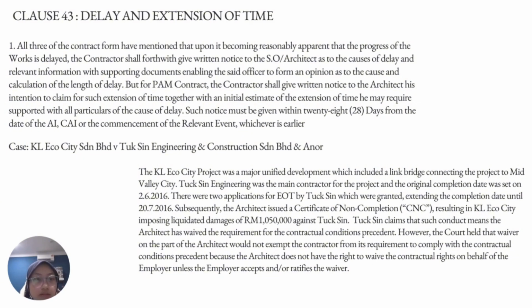Case that related to this clause is the KL EcoCity versus Tuxin Engineering. The KL EcoCity project was a major unified development which included a link bridge connecting the project to Mid Valley City. Tuxin Engineering was the main contractor for the project, and the original completion date was set on 2nd of June 2016. There were two applications for AOT by Tuxin which were granted extended completion date until 20 July 2016. Subsequently, the architect issued a certificate of non-completion, resulting in KL EcoCity imposing